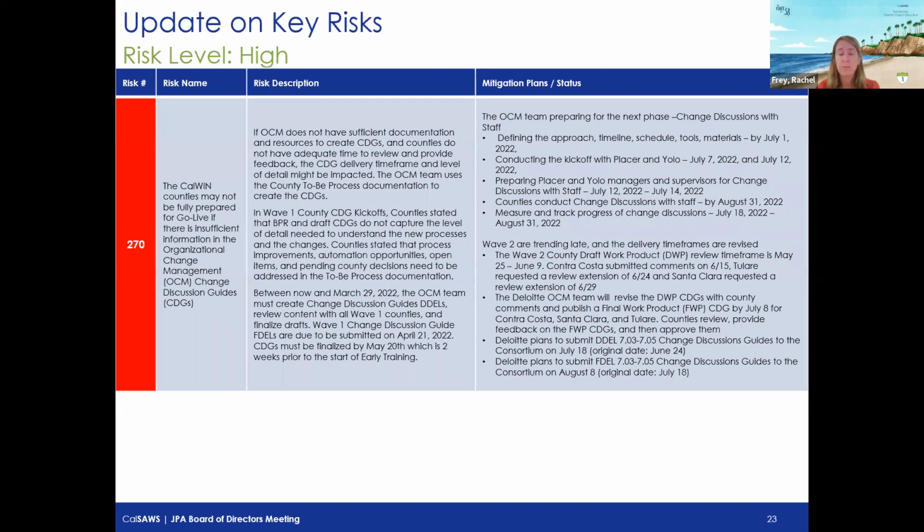And so for right now, for the wave 1 counties, we are moving from a red to an amber. We're leaving it in an amber status. And the reason behind that is we want to monitor how those conversations are taking place ongoing for the wave 1 counties. So we have checkpoints, we have office hours, we're meeting with the PPOCs on a weekly basis for wave 1 with the intent of getting feedback about how those conversations are actually taking place.